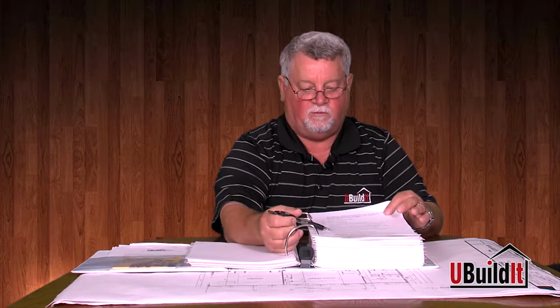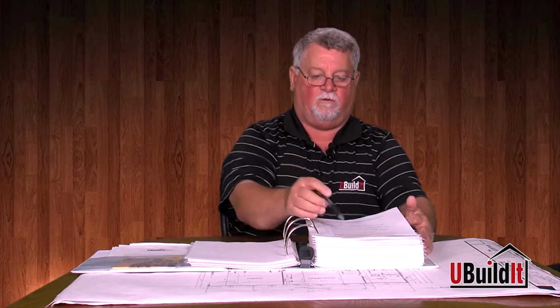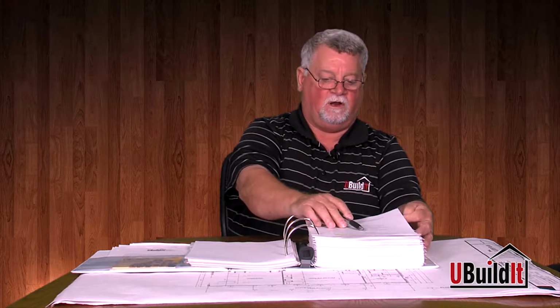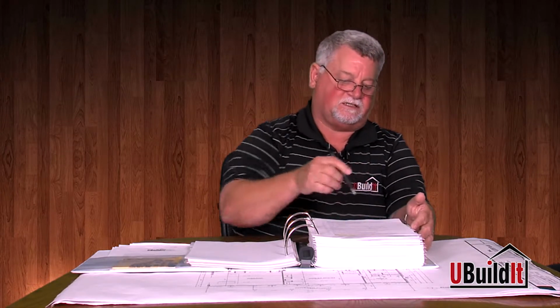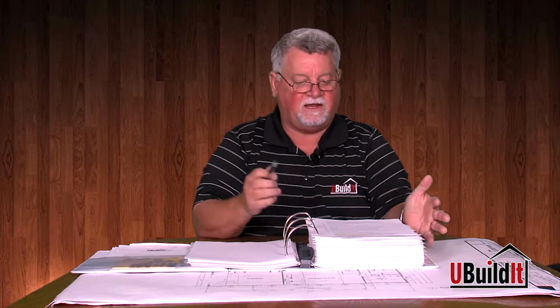After that, contact U-Build-It to schedule another site visit. At that site visit, we're going to come out and do foundation pre-pour, and it's checklist number 6. What we want to do is come out and be sure everything is in place, that all inspections are done and stickered. We want to be sure that the termite pre-treat has been done and is stickered. We want to check the floor plugs. If you have floor plugs that you want to put in, we want to be sure that everything is in there and we didn't miss anything.